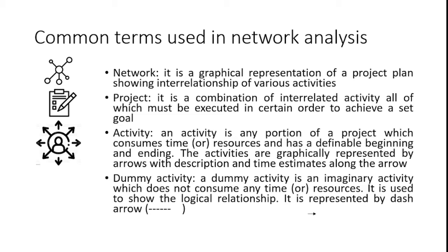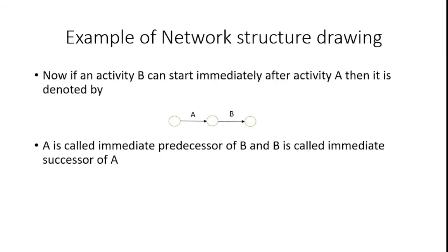And also, in network analysis we may utilize a dummy activity in some cases. What is meant by a dummy activity? A dummy activity is an imaginary activity which does not consume any time or resources. Resources means man, machine, material, methods. It is used to show the logical relationship. It is represented by a dashed arrow, which is known as a dummy activity.